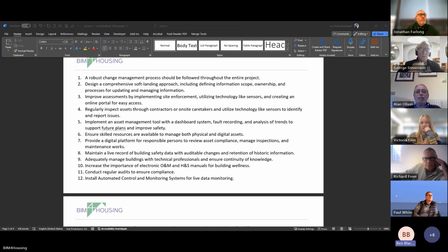Well, the architect's drawings define what's supposed to be done, and then you have trade contractors who may make some minor amendments in accordance with their materials and whatnot. But the architect should then update their details in accordance with the trade contractor's information.